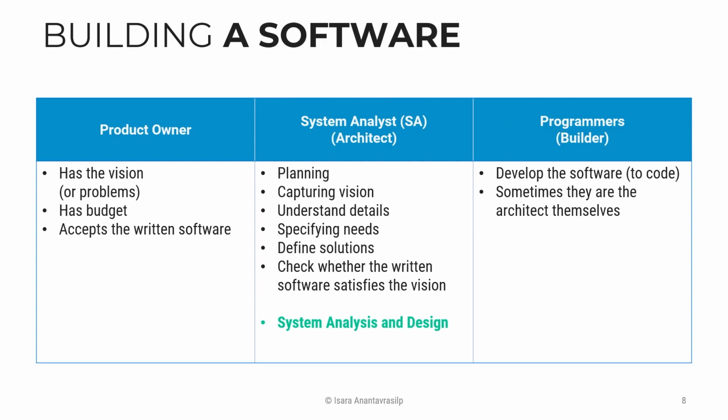Recently, in the last 20 years or so, we moved from this separate structure into a combined structure. One person does everything. He has to understand the user, come up with a plan, understand the big picture and the detailed information, and then also code. This shortens the development time. You don't have to wait for one person to finish so that another can work. You can just design a little, start working on it, show it to the customer, and ask if they like it. If they do, go on to the next component, and so on.